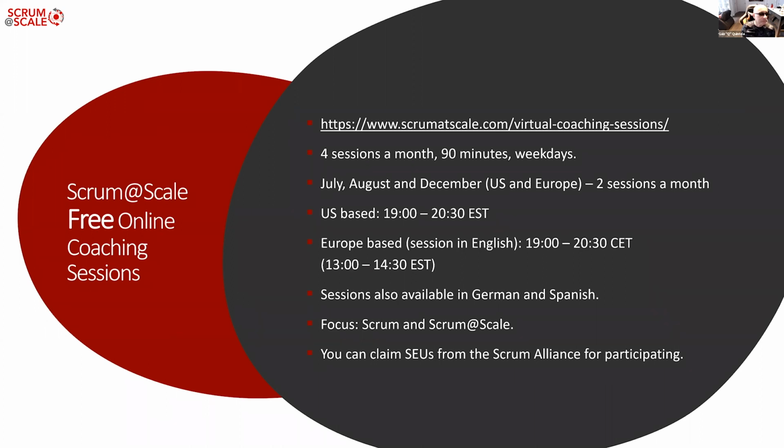Got it. Awesome. Thank you. An additional question, can we consider impact mapping as an event before we add to the product backlog on a regular basis? What is the interval to be considered? I wouldn't consider it an event because even refinement is not an event. Events are prescribed and they have a cadence. Things like refinement don't have a cadence. You can refine every day, you can refine once a week or twice a week.